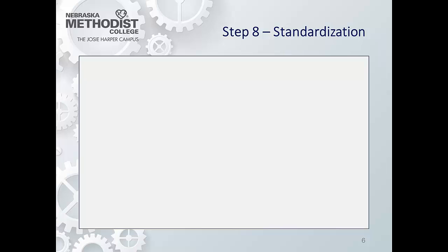Moving on to step 8, we see that step 8 is the final part of ACT in PDSA. If things go according to plan and improvements are made as expected, a project team moves from step 7 to step 8, where we standardize and celebrate. As noted in step 7, if improvements are not going as expected, the team should head back to step 4 and reassess the analysis of the problem to see what was missed.